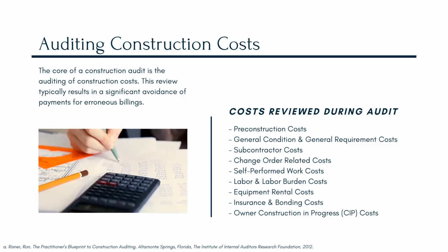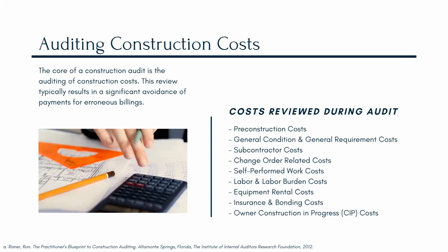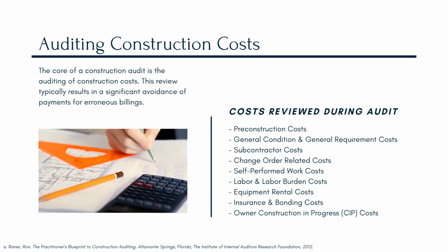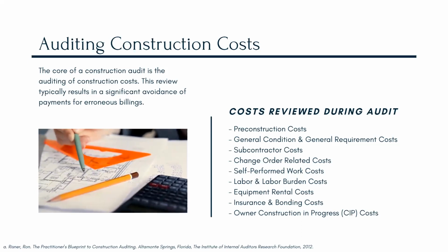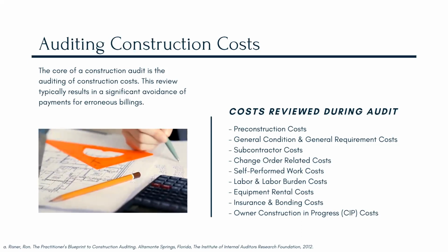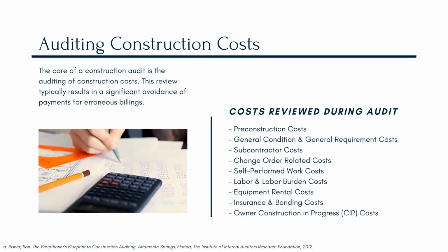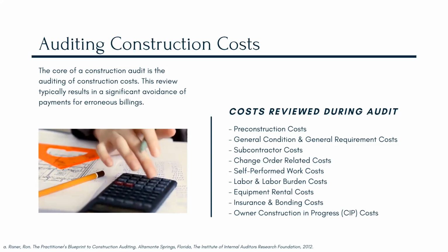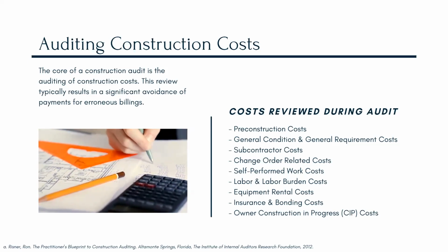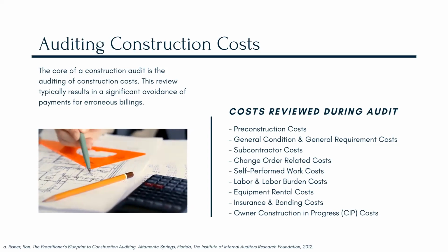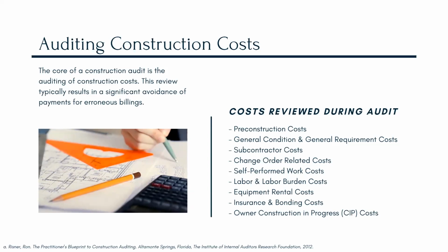That can be done by contacting the surety or the underwriter, verifying that the amount of the policy and the bond is what was represented, and getting that in writing, and ensuring that to the owner as a cost avoidance measure, so that if down the road a claim needs to be filed against the underwriter, the insurance policy is valid and in place.